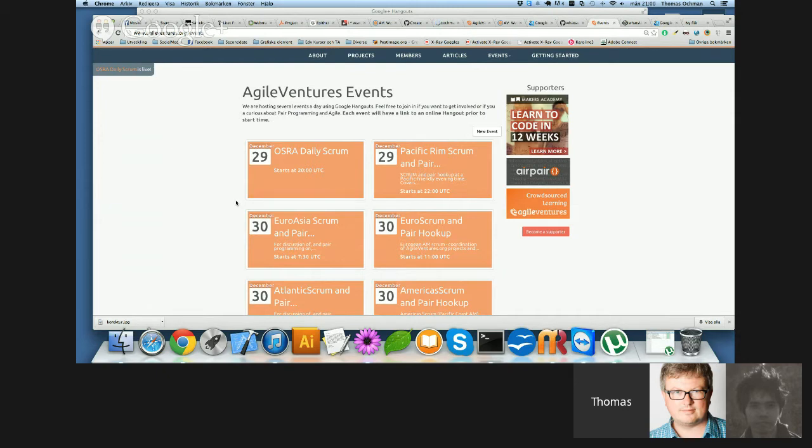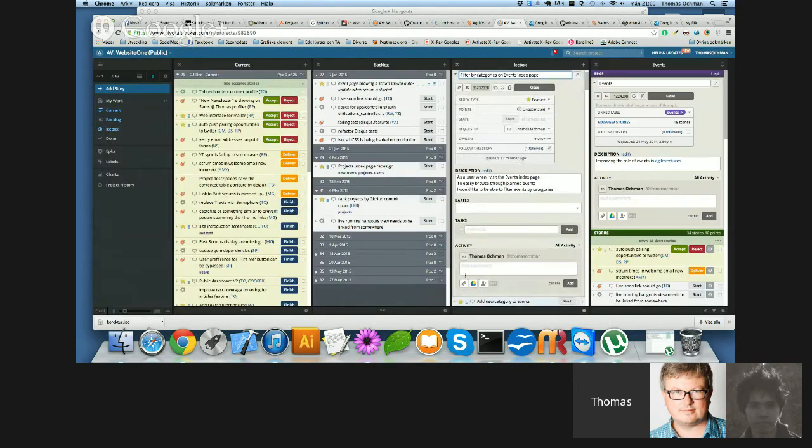All right, so let's not vote on it then, but rather say... Well, perhaps I'm wondering if we do vote on it, but you can create subtasks in the story. That the first subtask is to create the lo-fi. Okay. And then it's estimated, and we know it's probably going to be not a 1. Does that mean the lo-fi will be part of the story? Mm-hmm. Yeah. Okay.